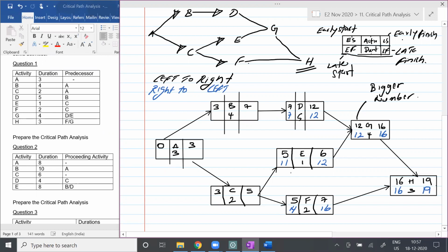Now, if you observe these two, students, are you taking it down? Yes. So if you observe these two here, there are two numbers. Agree, no, students? Like here, we took the bigger number. But in the latest event, you can't go with the bigger number. You should always go with what number, students? The smallest number. You get what I'm saying. You need to go with the smallest number. So I'll write down here smaller, opposite, okay?